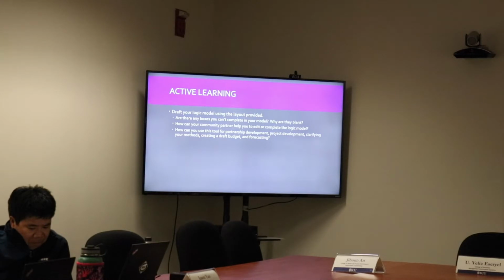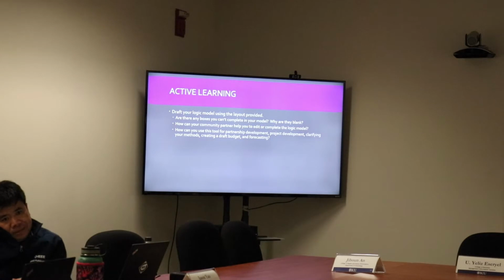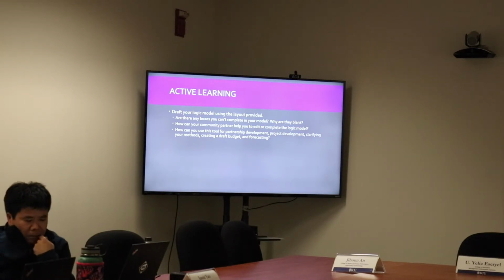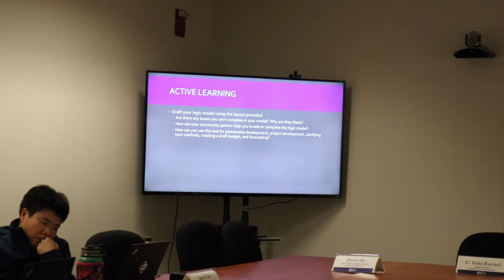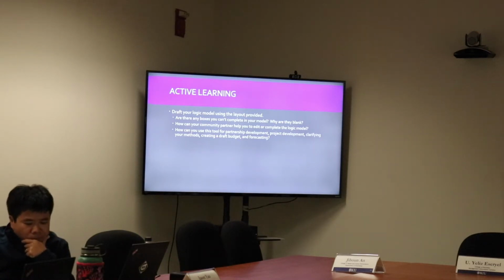What you should be able to see through your logic model is: if I have these resources, I can carry out these activities, which will allow me to have specific deliverables. And from those deliverables, these will be the outcomes for those specific people participating. And then broader than that, this other group of people or those in the periphery may have some kind of indirect impact, effect. So it should make sense. They should all link together. Or you can work from the opposite direction if you like.